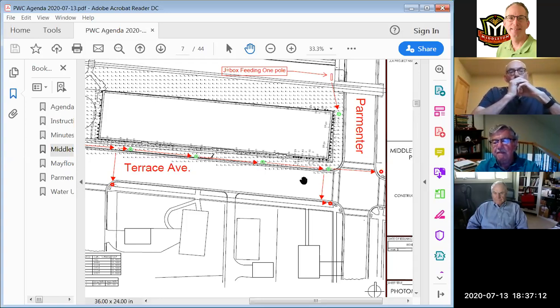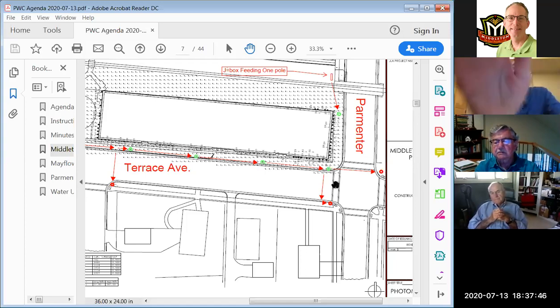I've already sent a note over to T-Well about some of the banners. There's a state law that went into effect a few years ago, effectively saying that banners can be hung on the full perimeter of construction site fencing, except where there's a local ordinance for safety reasons that would preclude some section. And we do have a vision corner clearance ordinance. So I passed a note off to T-Well, and he said, this is Scott T-Bon, who manages a lot of their construction work, that he'll coordinate getting a couple of those sections cleared back up along Parmenter Street. That would help. Yeah, I agree.